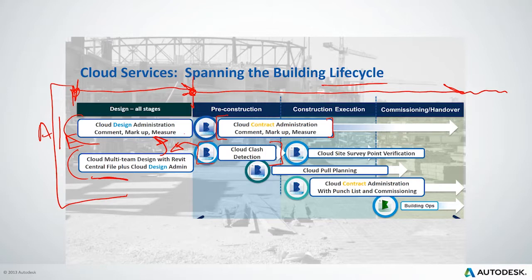So when I'm thinking about design, it's architects versus engineers and coordinating. And then when it comes into pre-construction, it's all about the fabrication models being coordinated, maybe by a GC or by a contractor or a construction manager. Somebody should be coordinating fabrication level detail models. So the structural fab versus the MEP fab, and so on.